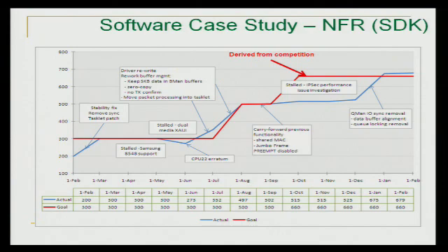Now, see how that red line, as time goes from left to right, kind of ratchets up over time? I'm making software releases periodically, and as I optimize this algorithm, the IP forwarding algorithm, I can raise the bar on how good I expect to be over time, because I know I'm going to get better and better as I optimize my software. And so that's the goal. The blue line is the actual. That's what I actually measured.